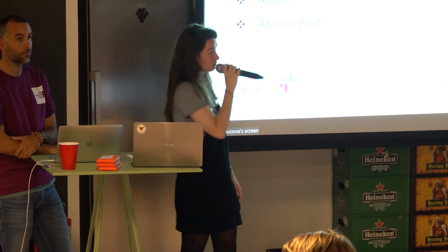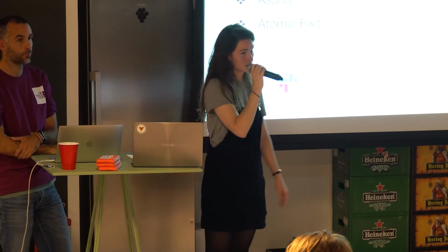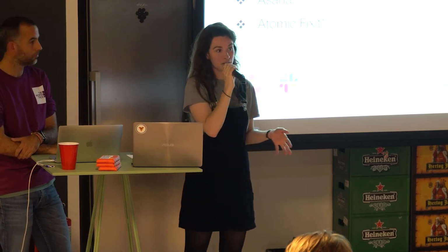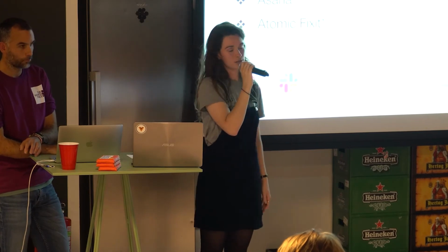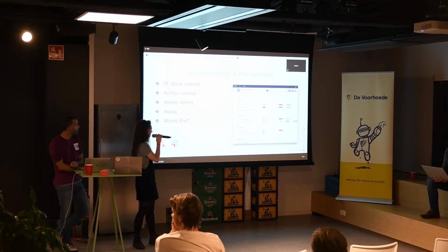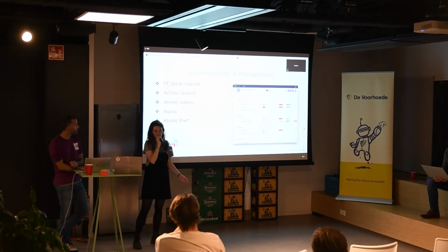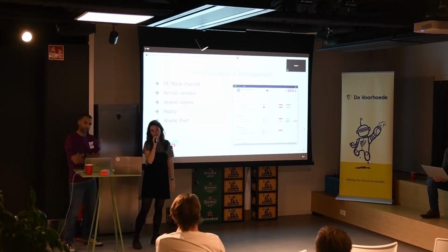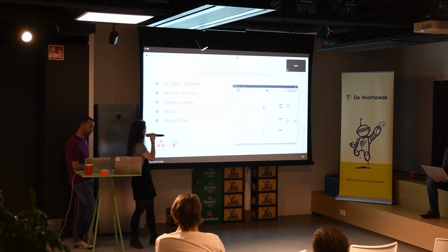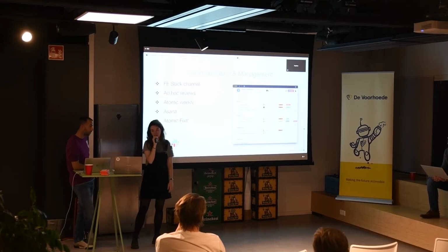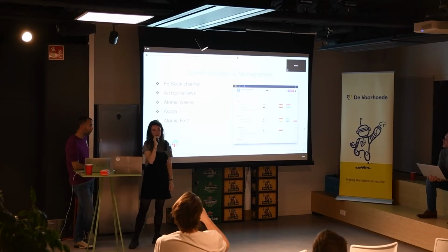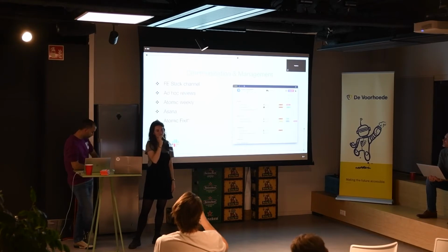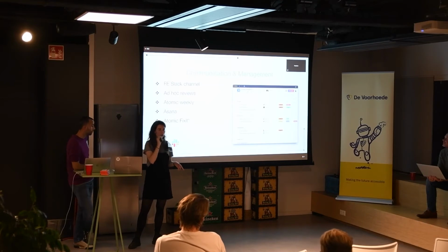And recently we also held Atomic Fix-It. As I mentioned, we work on sprints, so we don't have dedicated time to work only on the design system. We tried out a 2-week sprint only on Atomic to catch up and put away some legacy that we had, and really polish things up to not have so much debt. Yeah, and I think that worked really well. Being focused only on Atomic made our shared understanding better, and we aligned on a lot of things that I think would be hard to do during our normal sprint.